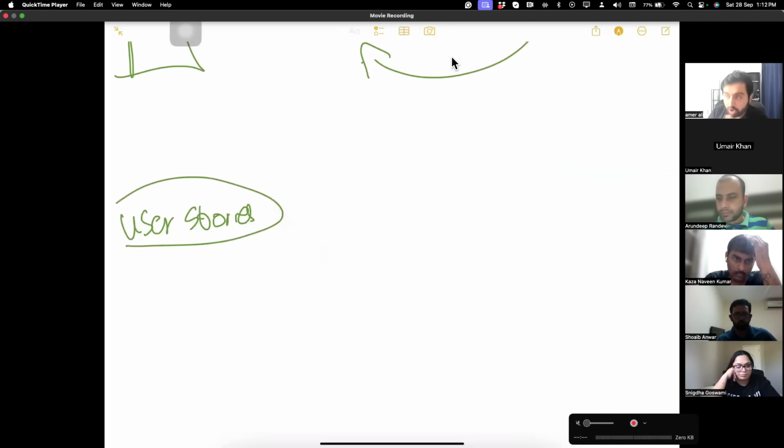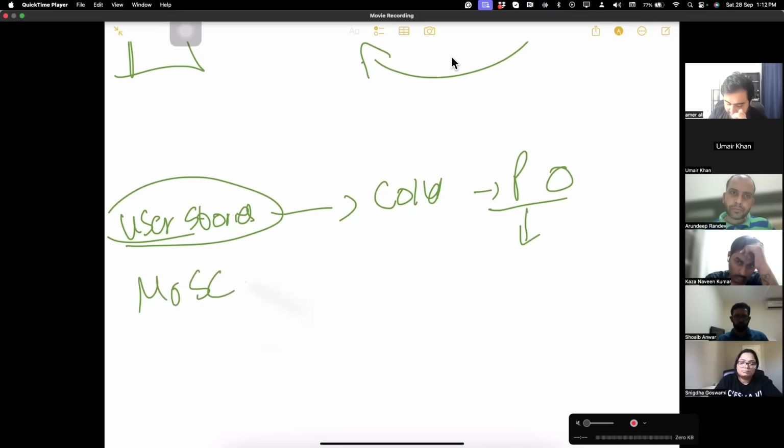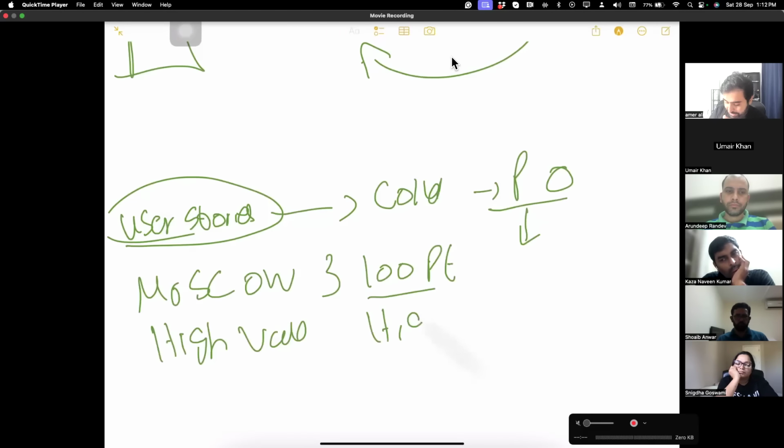They are collected by the product owner, who is the voice of the customer. The product owner collects the user stories from the customers and stakeholders, puts them in the product backlog, then prioritizes them using prioritization techniques like MoSCoW (must have, should have, could have), 100 points, and dot voting. He prioritizes the product backlog by high value, and with the help of the team, by high risk.